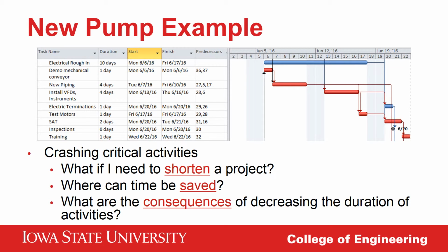So that's 500,000 pounds of missed production. In round numbers, the profit of this material is about 20 cents per pound, so $100,000 lost. Armed with this information, it's time for me to get to work. If I were in front of you, I'd ask if, due to the nature of the Gantt chart timeline, any of you saw some obvious ways to shorten the downtime.